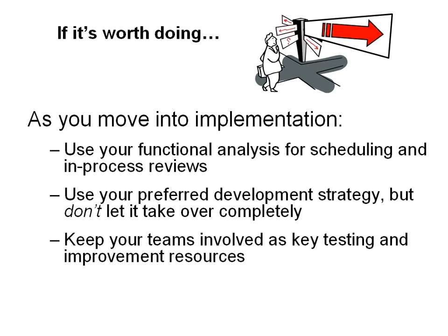Keep your teams involved, because now you've got a testing resource. You can bring people in as new technology comes in, sit them down at a terminal and say, okay, do what you do, and you know what this should happen, how this should work, and let's see what happens. It's amazing at the suggestions for small customizations that operational people who really understand what they're doing and what they're testing can offer. In many cases, things that don't cost anything. It's just, well, if it worked this way, or if this happened ahead rather than behind, it would work better. And they can be an amazing resource. So by all means, use them. Keep them involved.